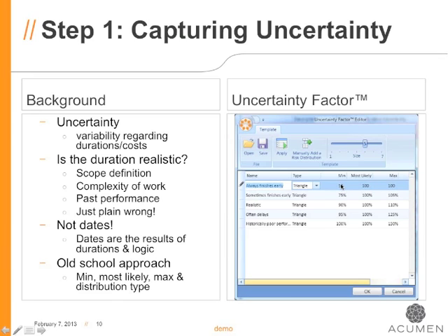Now, you may be thinking, well, okay, that's a really effective way of applying uncertainty, but isn't that limiting me as a project team member with regards to my ranking? Well, absolutely it's limiting, because what it's doing is it's avoiding team members coming up with crazy ranges. So to give you an example, if we have a 50-day activity and a team member says, well, the best case is 45 days and the worst case is 300 days, that 300 days, that's not a range of uncertainty.